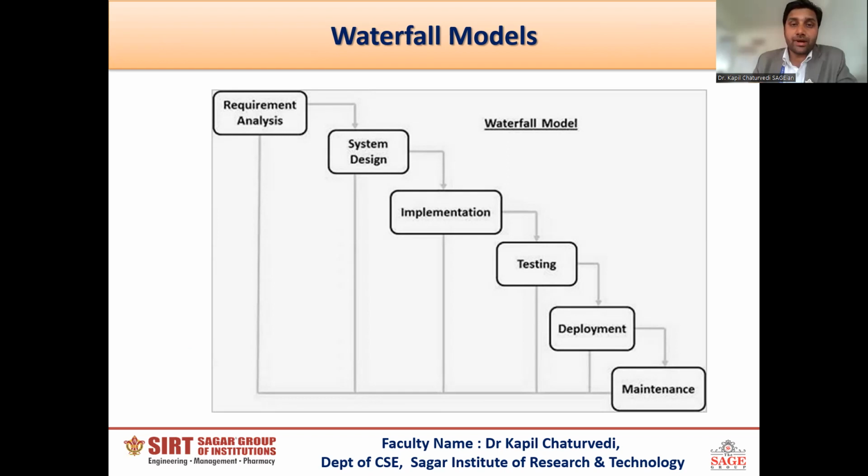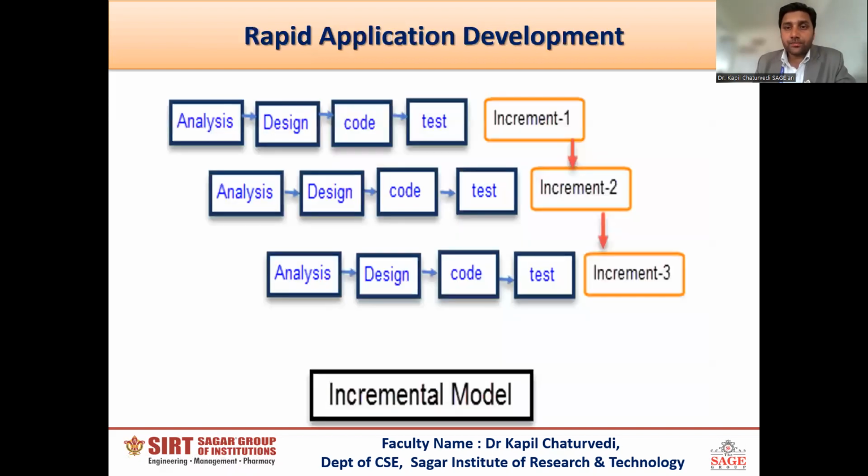What thing do we have to keep in mind? This is the waterfall model, and as per the property of the waterfall, once we complete requirements, we go on to the system design. Once we complete system design, we come to the implementation phase. Whenever we are working on the implementation phase, we will never go back to the design phase, and when we are working on the design phase, we will never go back to the analysis. It means we have to complete one task and then go on to another task. We will try not to go back anytime. So this is the waterfall model.